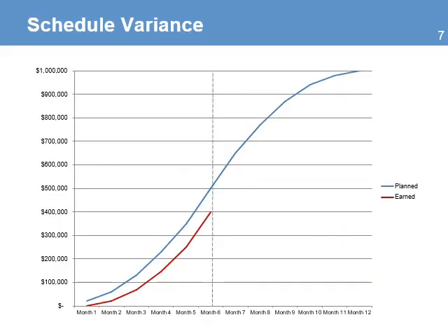Another tool to help monitor variances in the schedule comes from the earned value analysis. Here's a chart showing the planned value in blue line of a project expressed in constant time. Planned value follows an S-curve shape that reflects the work effort that occurs during the project lifecycle. In this example, the project manager makes an analysis on month 6. This is a 12-month-long project. The planned value at this time is $500,000. The red line shows the actual value that the project has completed, $400,000.